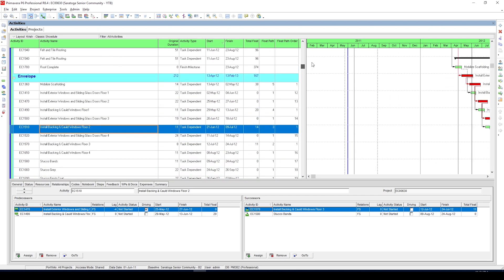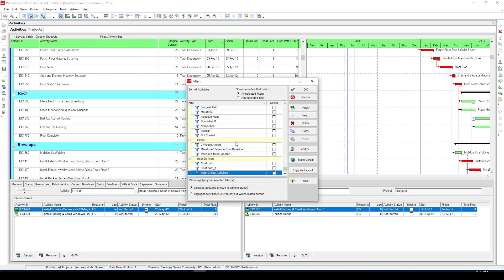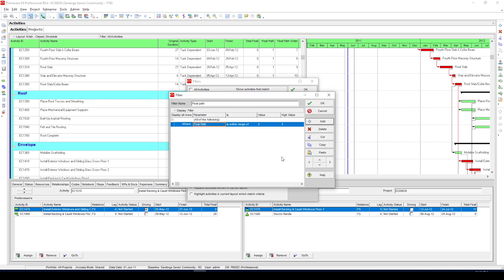Now to sort out near critical activities, click on filter and you can create a filter like you see on my screen with float path between 2 to 5. This should do the trick.